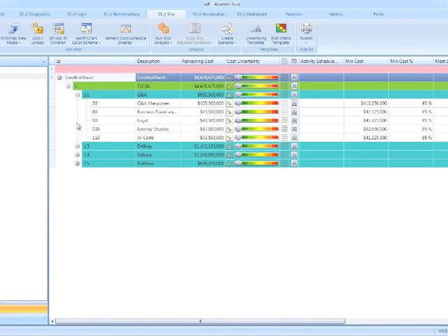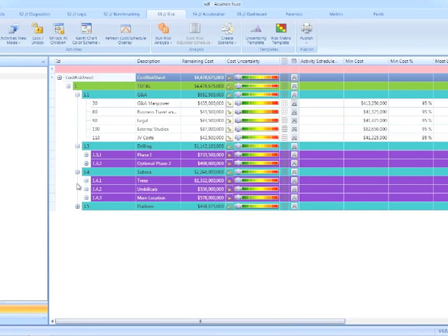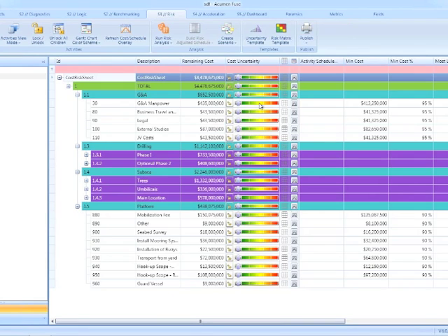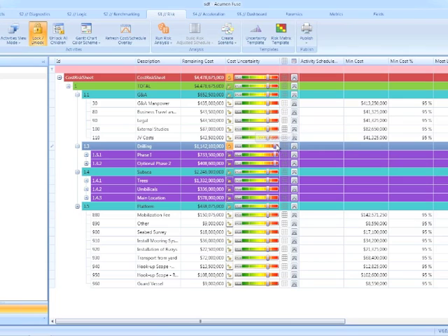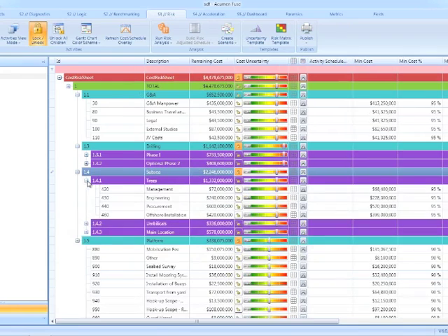And in the exact same way that earlier we assigned our uncertainties to schedule, we'll do the same thing to our cost estimate. Let's make our drilling costs very aggressive. Let's make our platform costs realistic. Let's make our subsea costs aggressive. Maybe there are some exceptions to the rule within the procurement of trees. Okay, so again, we are assigning uncertainties to our cost estimate.